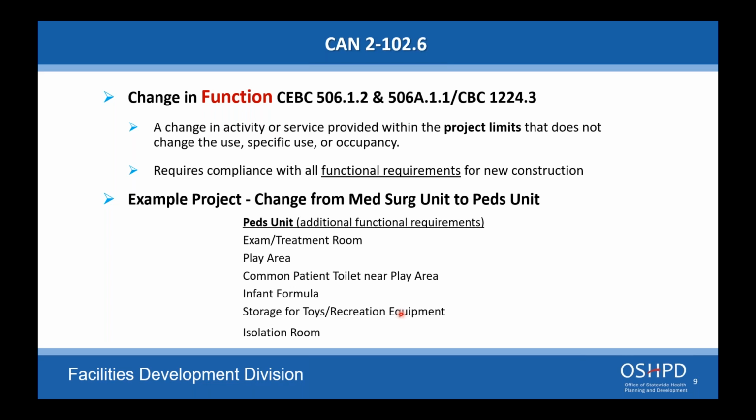Yeah, all the new construction has to meet current code. If you're pulling wire through existing conduit, those do not need to be backtracked and brought up to current code. That being said, if you're accessing this space, it might be a good time to bring them up if they are not compliant with the NPC requirements for bracing. But there should be no trigger to do so if you're just reusing existing components.